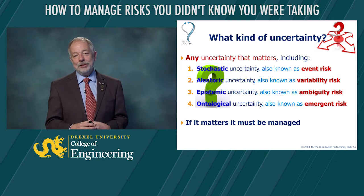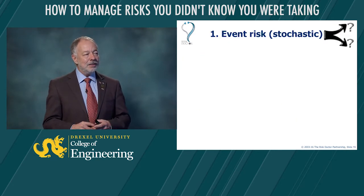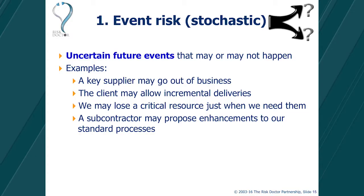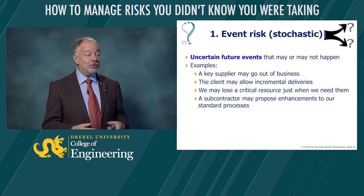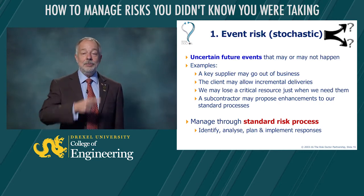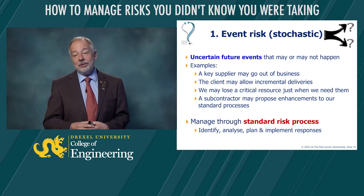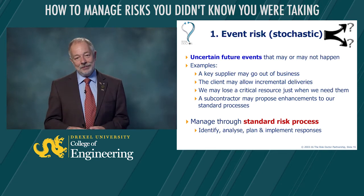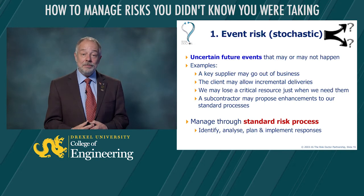All of these types of uncertainty, if they matter, need to be managed. We need to include them within our risk management thinking and practice. Let's start with stochastic risk or events — this is easy, because these are the uncertain future events that most of us think about. Typical examples would be losing a key supplier during the project — it might happen or it might not. The client may choose to allow incremental deliveries — that would be a good thing, or they might not. We might lose a critical resource just when we need them, or they might stay with the project. These are absolutely standard uncertain future events which we manage through the routine risk management process: identifying the risks, analyzing their probability and impact, planning responses, then implementing them, then having a risk review that repeats.